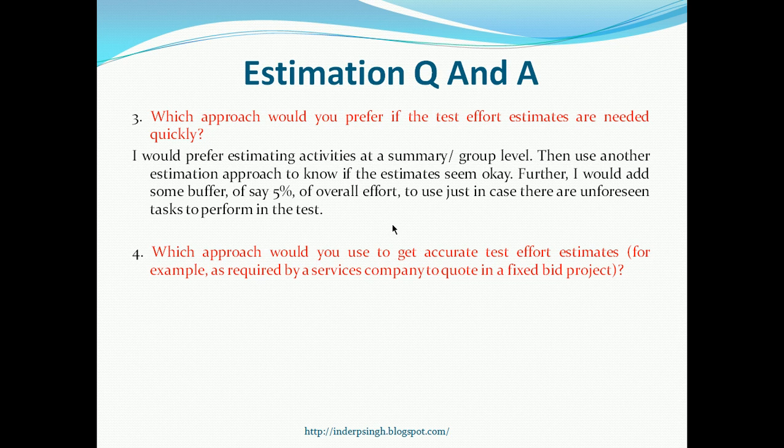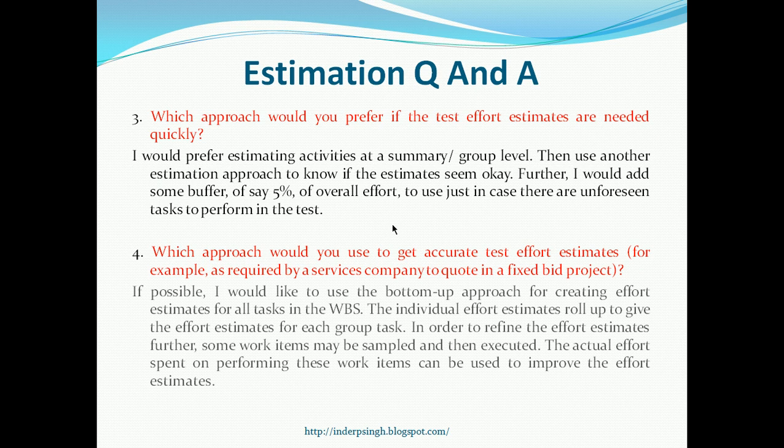Next question is, which approach would you use to get accurate test effort estimates, for example as required by a services company to quote in a fixed bid project? So if you're working in a services company that provides testing services to their clients, and you have to give a quotation for a fixed bid project, that means the price of the project is going to be the same. You need very accurate test effort estimates.